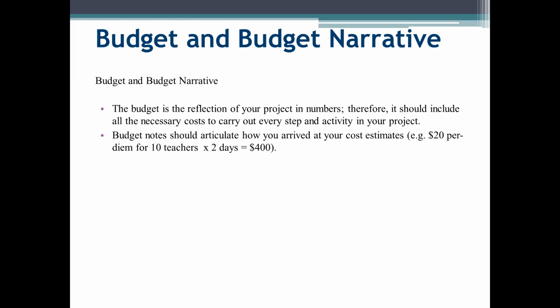The budget narrative should also spell out how you arrived at each estimated itemized cost and include prices and unit totals. We understand that your final budget may reflect some changes to the budget after materials are actually purchased. So just estimate. That's what the review panel is looking for. Make sure that you've done any research that's necessary to determine the amount of money that you're requesting in the proposal.